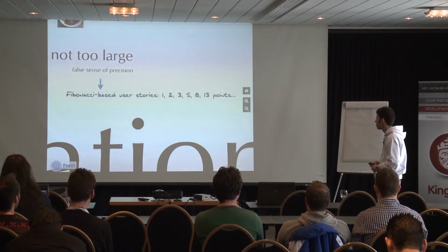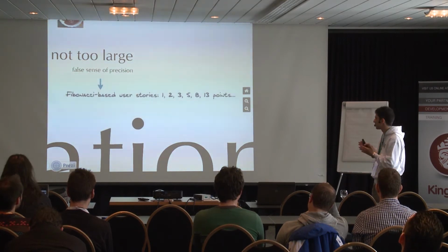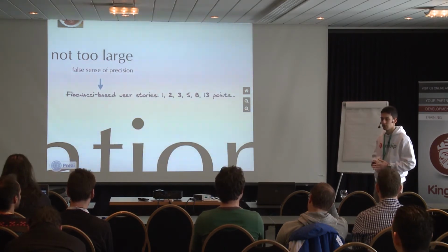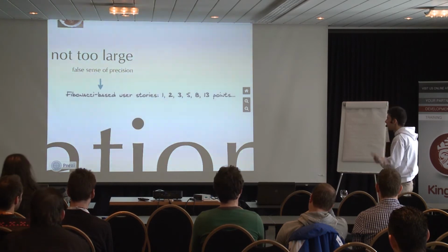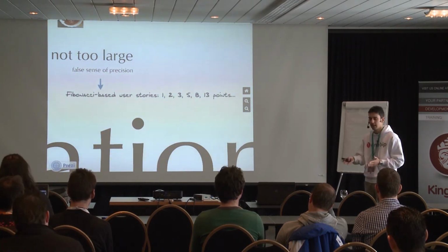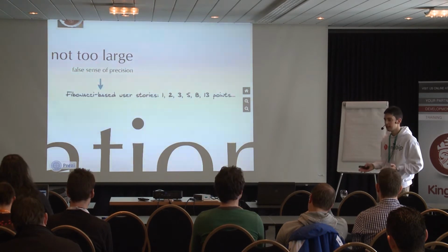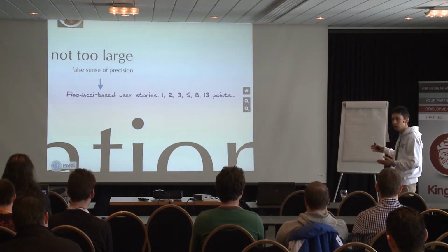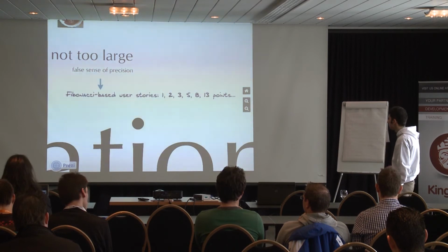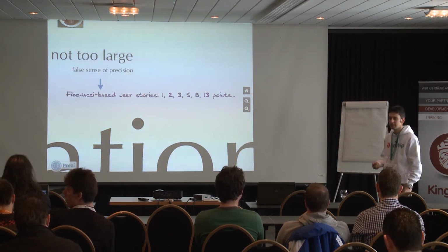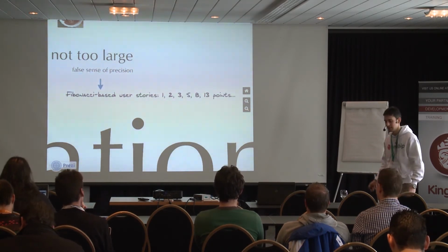In our case, it is a number of Pomodoros. So I may say that this task will take me 8 Pomodoros, or 14 or 20, but I won't go into the detail by saying it's taking me 13, 15 or 16 Pomodoros, because again, it's a false sense of precision. There is a variance in this estimation, so an error that you will make with respect to the real duration, and this error will naturally go up when the task grows. So using these increasing intervals in your scale lets you make realistic estimations. So it's 13 plus or minus 2 Pomodoros, not 13.